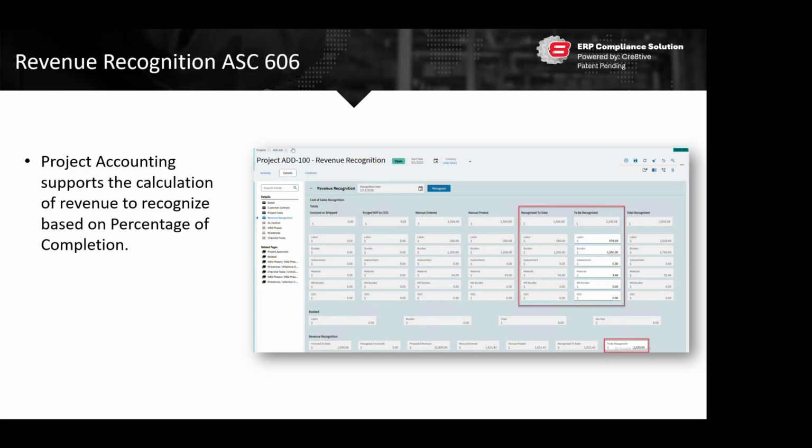And revenue recognition can happen through different methodologies, right? It could happen on invoice if that's how you want to define it as part of your contract configuration, or it could also be something that you do more of an ad hoc basis based on percentage of completion, cost to cost methodology, or maybe just a manual calculation that you want to define based on your own revenue recognition requirements. Most commonly, what we see in the industry is that percentage of completion based.